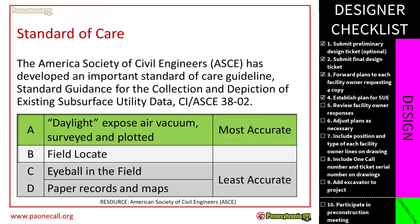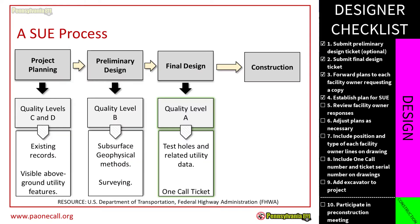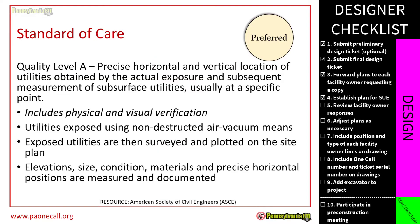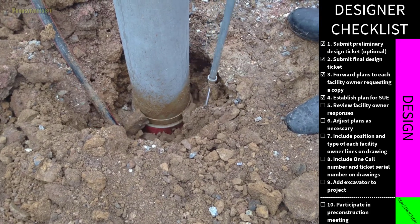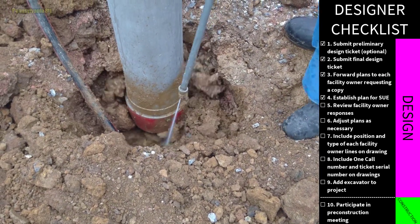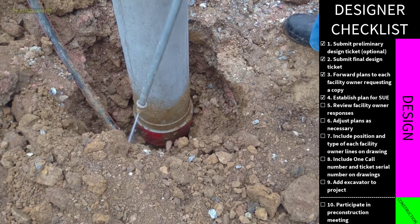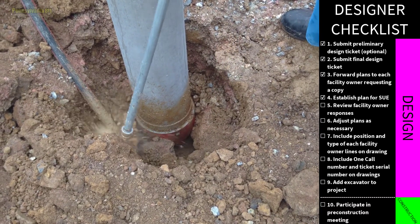The American Society of Civil Engineers has established four SUE quality levels ranging from least to most accurate. Levels C and D — eyeballs in the field and paper records and maps — are ideal for the planning phase. During preliminary design, quality level B (field locating) is used, bringing in a private locator to survey the worksite. In the final design phase, level A — the most accurate standard of care — uses soft excavation techniques like air vacuuming to create test holes, daylight those facilities, and determine their exact locations. SUE results are integrated into design plans to accommodate existing infrastructure and reduce the risk of conflicts or damage.